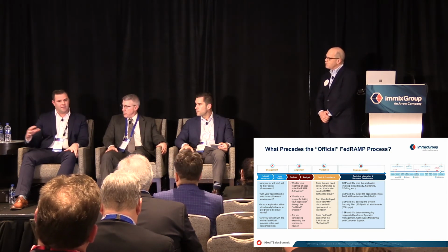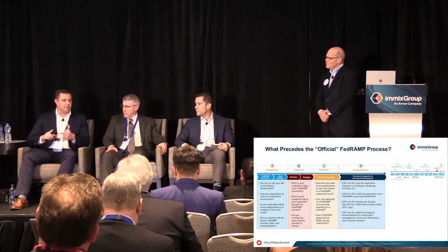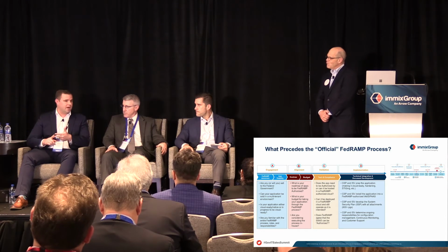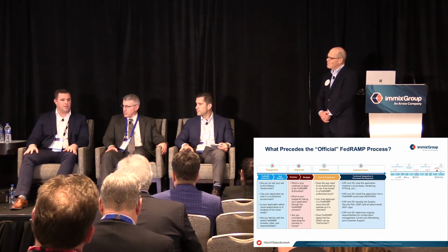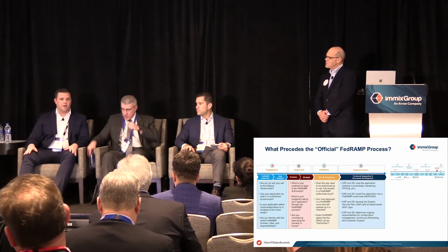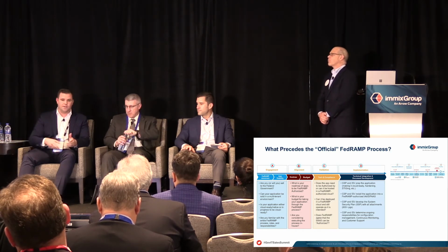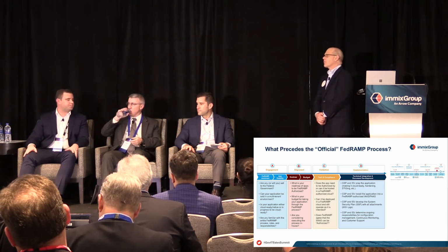And it kind of stems from a lesson learned, right? Where we had an ATO, we had market demand, we had corporate buy-in, but then when you get to the product development group and engineers, and there's a new generation of product coming out, all of a sudden that delay is 6 months. So then a lot of work that has been done has to restart.